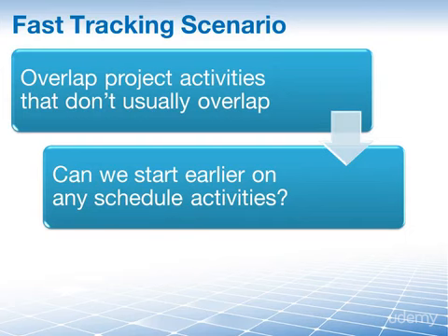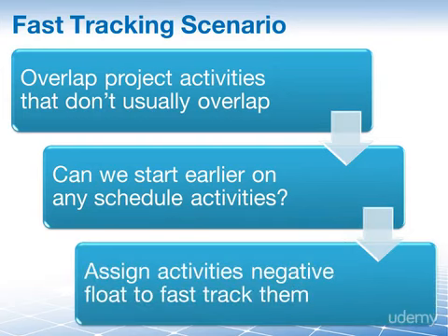By the way, do you remember the float that we discussed earlier, and I mentioned that float can also be negative? Well, that is exactly what we are doing now. We are giving a negative float to these activities so that they start before their predecessors finish in order to meet our overall project target finish date.